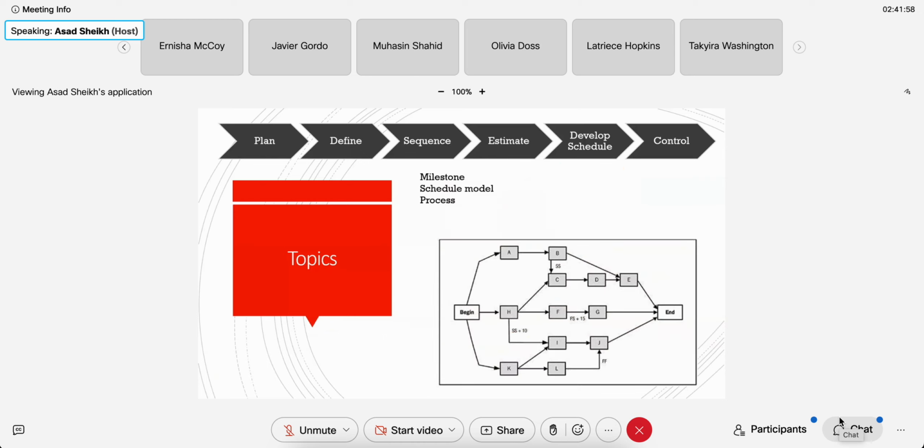All right. So milestone. Milestone is easy because remember we said once you decompose, you should get a milestone list and an activity list. Activity is easy. It's just a task. Milestone has zero duration. Milestone could be training completed. So training completed is a milestone. It doesn't tell you when it started. It doesn't tell you when it ended. It just says training completed, and that's a milestone.